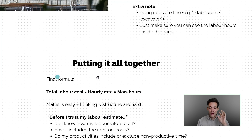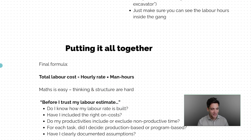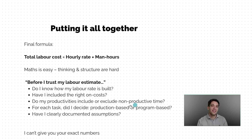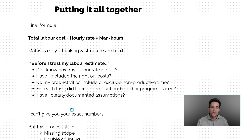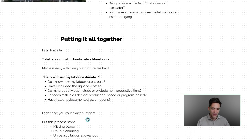To put it all together: our total labor cost for the project is simply the hourly rate multiplied by the man-hours. The maths is easy — making sure all the input numbers that go into the hourly rate and the man-hours are correct is the hard part. Before you calculate your labor estimate, ask yourself: do you understand how your labor rate was built up? Have you included the right on-costs? Do your productivities include or exclude non-productive time? For each task, did you correctly determine whether it's production or program-based, and have you clearly documented your assumptions? This is the process to think through your labor estimates to avoid missing scope, double counting, and undercounting.